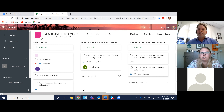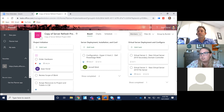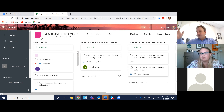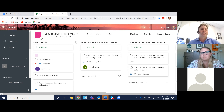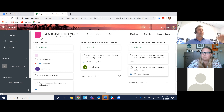So let's pretend we're doing a server refresh project for one of our customers — we're going to be putting new stuff in their environment. A project manager who loves this tool goes in and creates different tasks and activities under different components of the project. So obviously, we have a project initiation. We have the server actual deployment installation and configuration component. We have the virtual server component where we have to do the virtual server configuration. We then want to go and migrate data. And then from there, we get rid of old servers — they call it decommission — and we then do documentation for our customers.